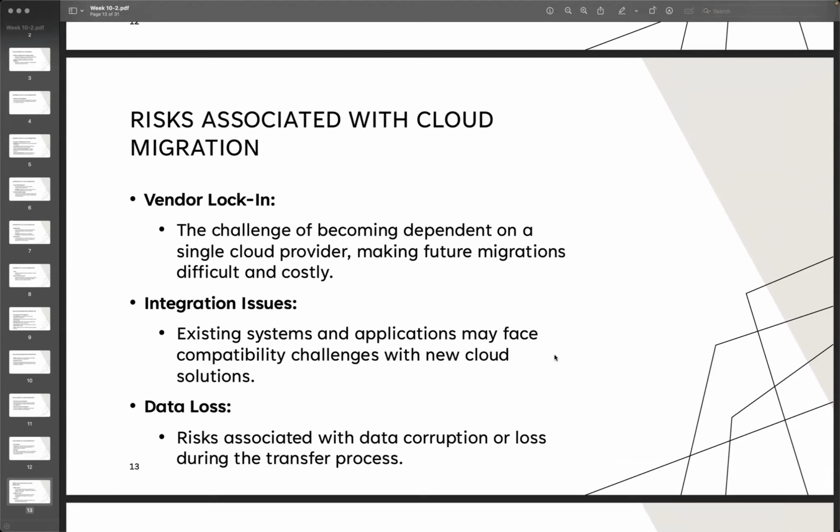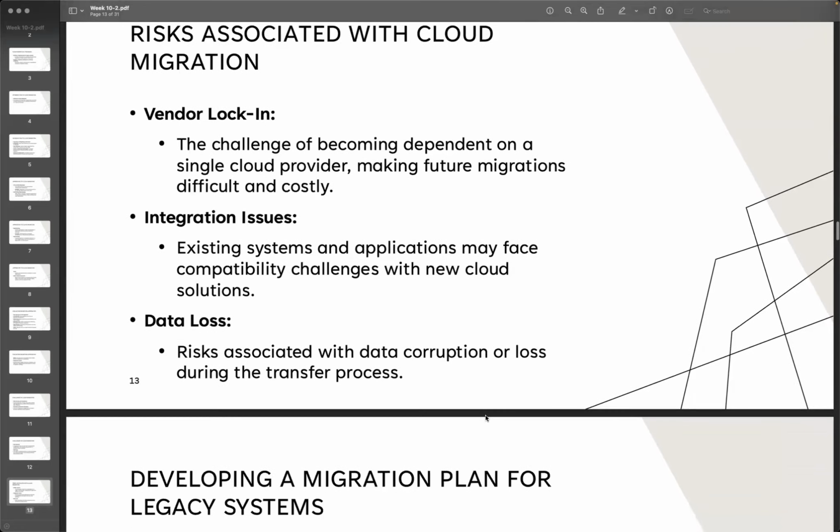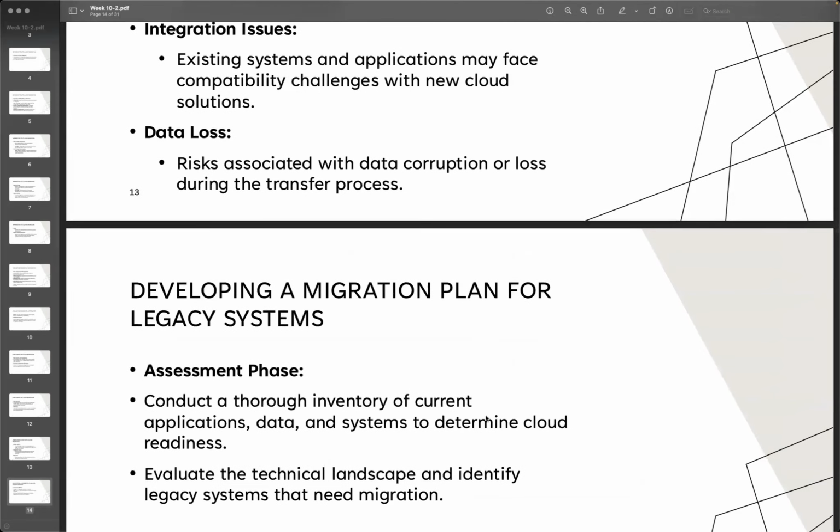Sometimes when you are transferring 20 terabytes, 50 terabytes of data, it's impossible to check all the files one by one. Maybe after you finish migration and some employees start using it, they realize a certain file is already corrupt, but you completed the migration a month or two ago. Maybe your old system is already shut down and no longer in use, and then you have a problem. So you need to think about keeping it and validating after maybe 6 months or a year, and make sure everything is working fine, then you are able to shift.